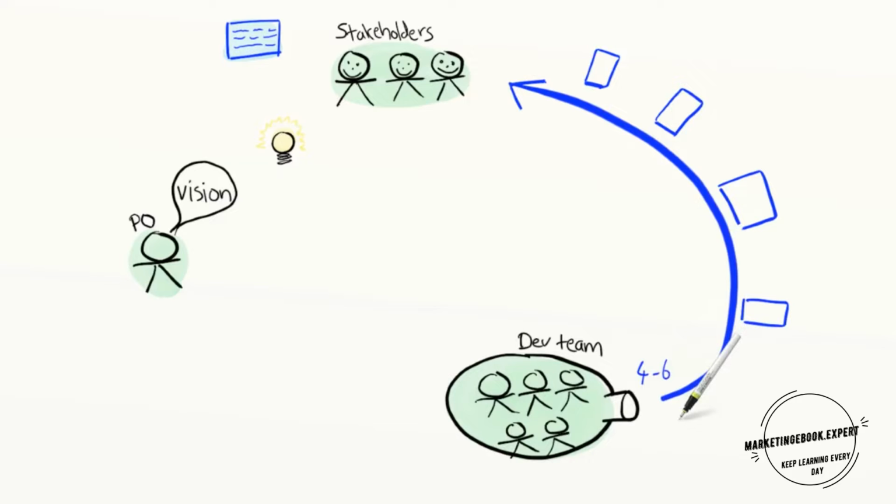Capacity is easy to measure. Just count the number of stories released per week. Some stories are big, so they count as 2. Some are small and count as a half. But all in all, it adds up to about 4 to 6 stories per week. Some people call these story points, but I'm just going to call them stories per week. In order to maintain this pace and not get bogged down by manual regression testing, the team invests heavily in automated testing and continuous integration.